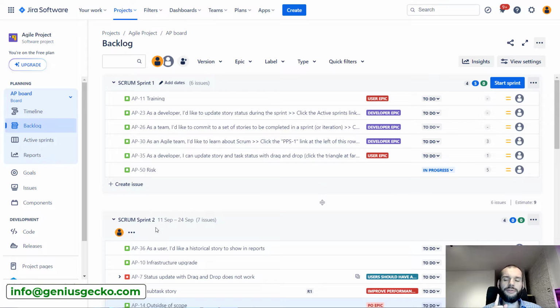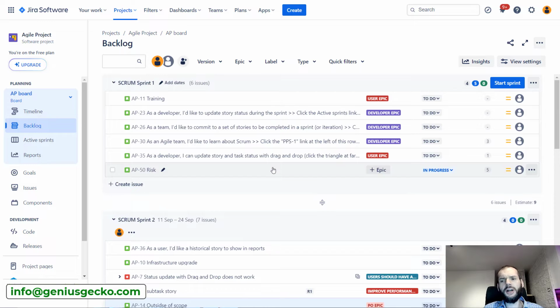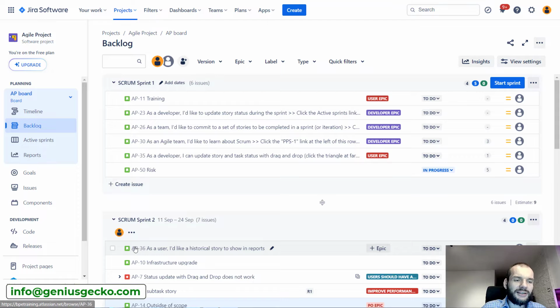First of all, with more teams, you will just have a lot of ongoing sprints at the moment. From experience, I know that this is not too easy to work with and not too easy to read. Second of all, if there are dependencies between the work done by the teams, you do not see them here. So basically, before you plan anything, you need to enter the task, see if there is a dependency and whether you can already plan it or not, and try to resolve that. It takes a lot of time.